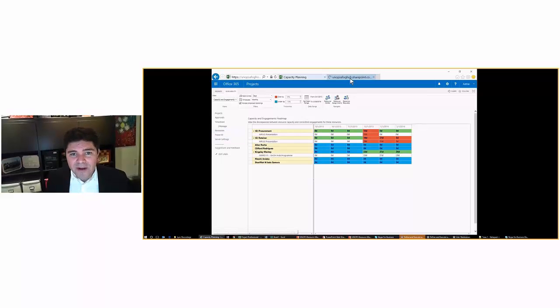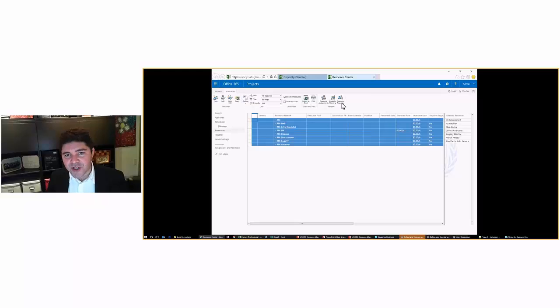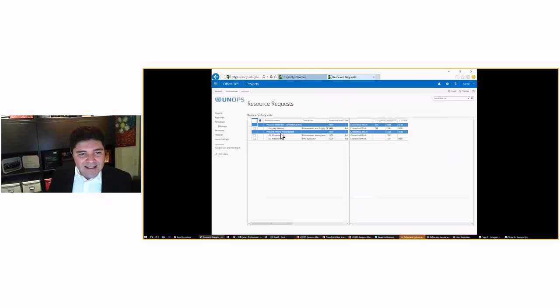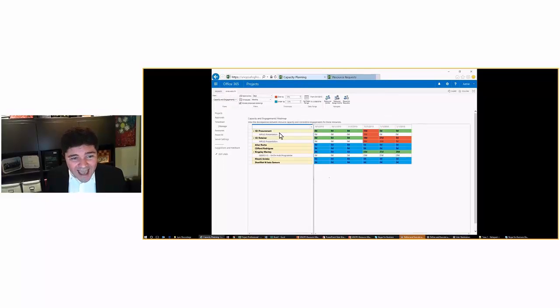If I open a new page now, I can do exactly the same with the same resource and check all the requests. Look at this. I can see that I have my input presentation, and in it there are 360 hours requested for retainer and 120 hours for procurement. When I go to my capacity, I can look exactly at who in each role has the availability. I can see here that Allan is available, which is perfect. I can use him as my retainer.